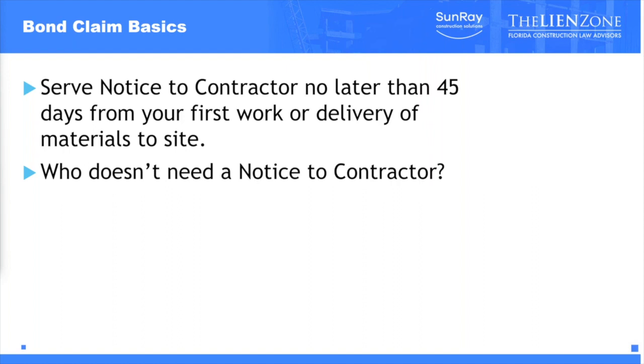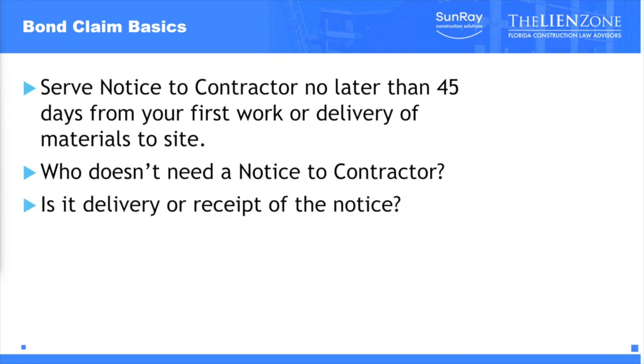The person that does would be the sub-sub. So if I'm the electrician and I hire out some labor, or my material supplier, they would be a vendor to me, the sub, or they would be a sub-sub. They need to serve this notice to contractor. That being said, our advice is you should serve the notice to contractor no matter what. You should have a process in your office to timely serve these notices, both notice to owner and notice to contractor.